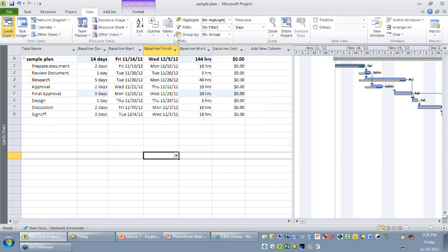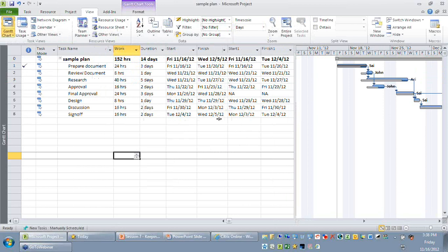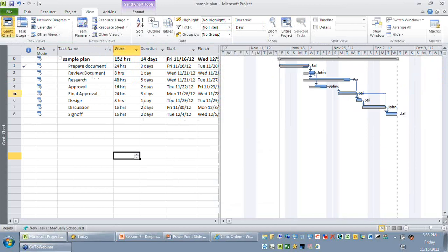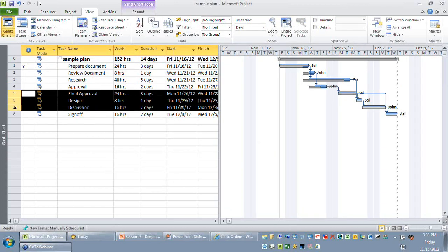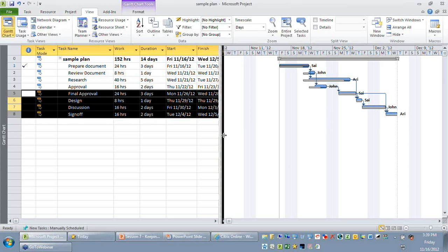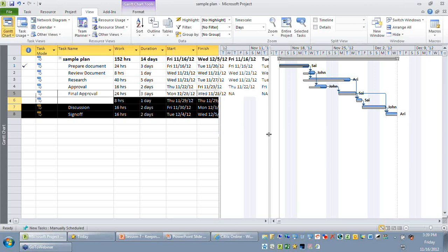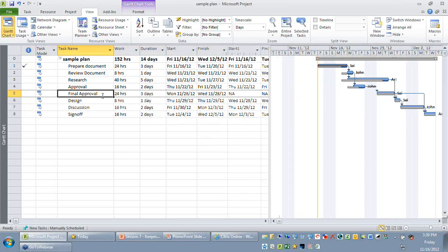And let me change my table to the entry table. Now if you closely observe to your right, it's only the activities that follow that are getting baselined. The activities that are before that still have that 1 day slippage in your project. So this is how you need to take care of updating a baseline for an approved change request.